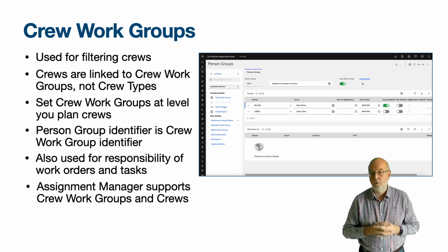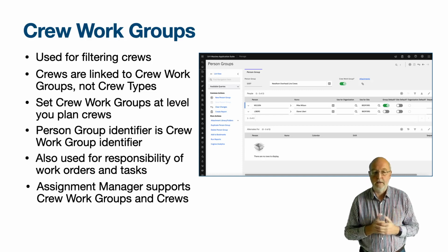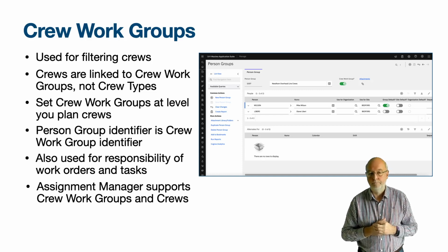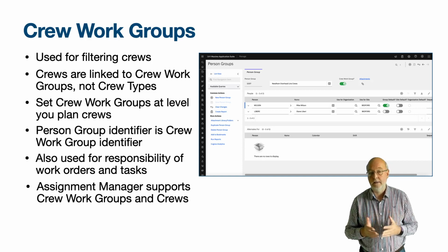There is an action called Crew Assignment Options in the Organisations application with one field for setting the availability factor for all crews. This affects the available hours of the crews in the Assignment Manager application. For example, an availability factor of 0.75 on a calendar with an 8-hour shift means that the crew is available to be assigned up to 6 hours of work on a day.